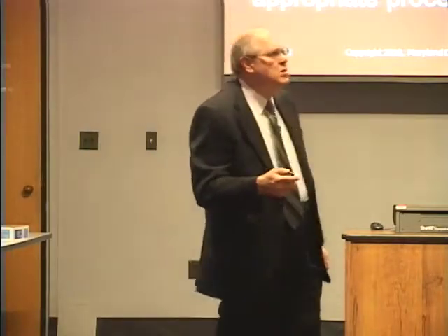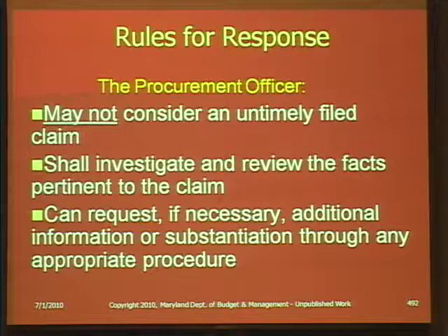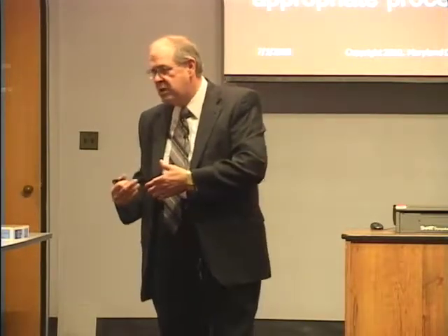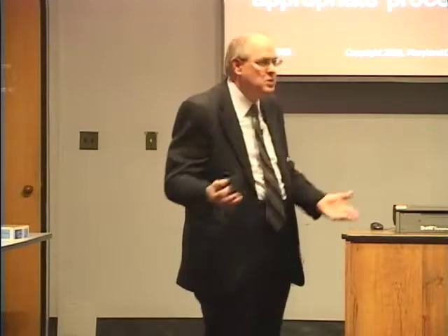Let's see, shall investigate. So the procurement officer, if it's not timely filed, hard copy in your hands, but within the 30 days for the notice and the additional days for the actual claim, you won't do it. But if you do have it in timely, you will investigate and review the facts pertinent to the claim. Now, hopefully, you don't have to do a whole lot of investigation. Hopefully, you or the contract manager knows what the facts are, and even if the procurement officer doesn't, the procurement officer simply goes to the contract manager and says, okay, tell me what's going on. Here's what the vendor is saying.